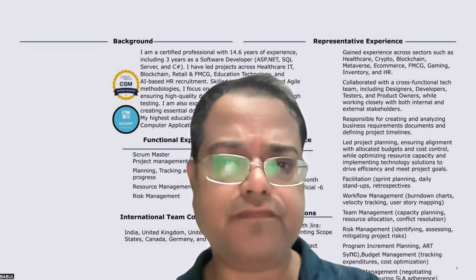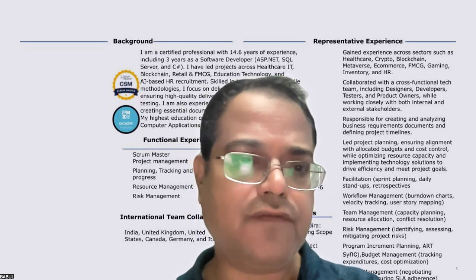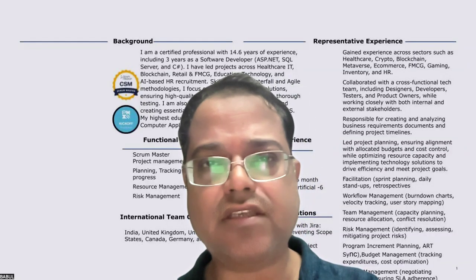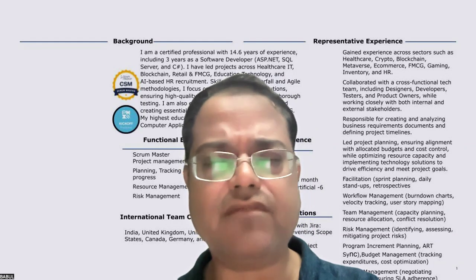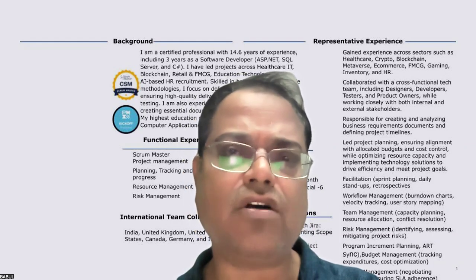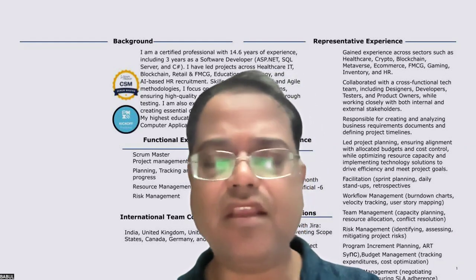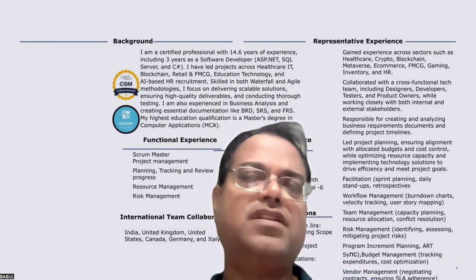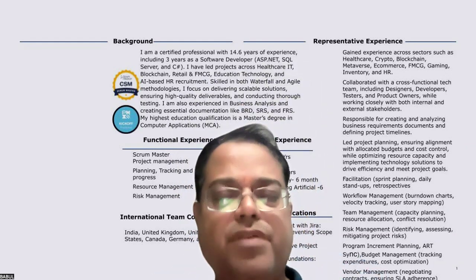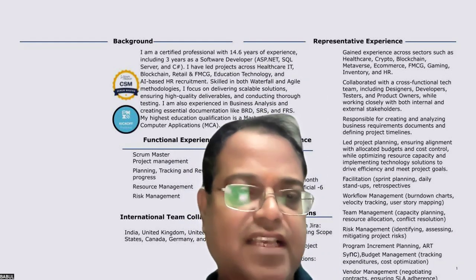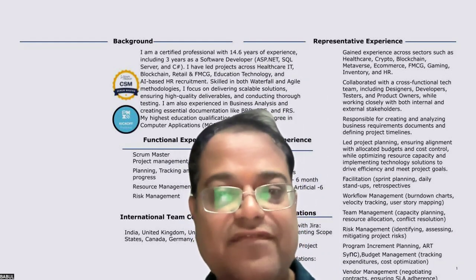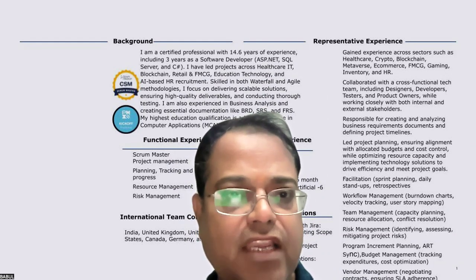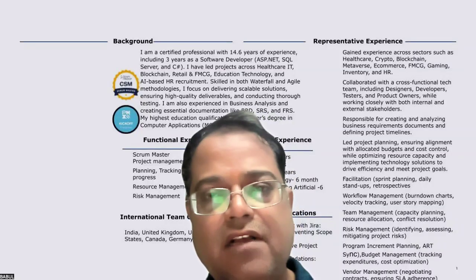And if any last changes are UI changes which do not affect the user experience, that is all about the icing on the cake. So it can be taken to the next sprint. All those things happen with the coordination of the PO and the stakeholders. We have to align and prioritize with the PO.